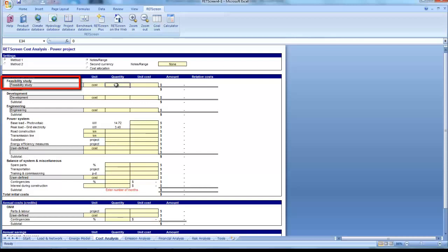Once the proposed case project has been identified through the feasibility study, project development activities follow. For some projects, the feasibility study, development, and engineering activities might proceed in parallel, depending upon the risk and return acceptable to the project proponent.